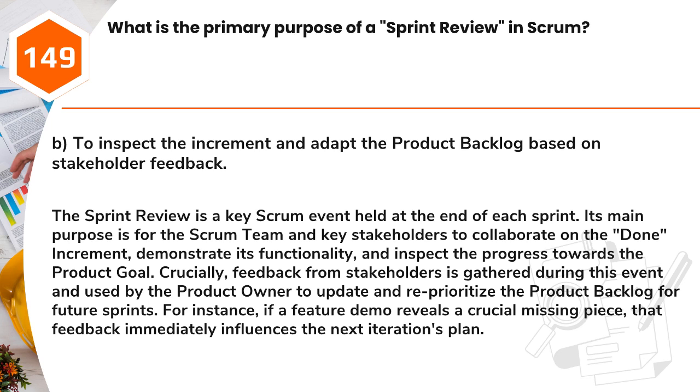Crucially, feedback from stakeholders is gathered during this event and used by the product owner to update and reprioritize the product backlog for future sprints. For instance, if a feature demo reveals a crucial missing piece, that feedback immediately influences the next iteration's plan.